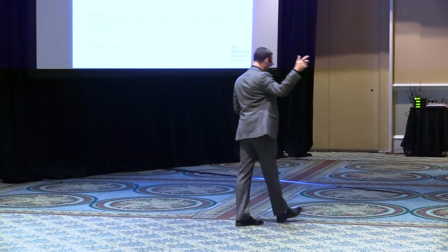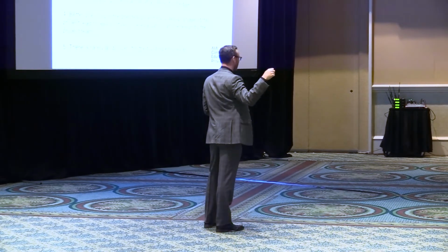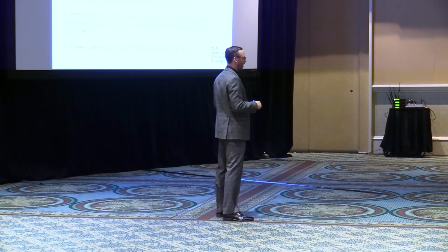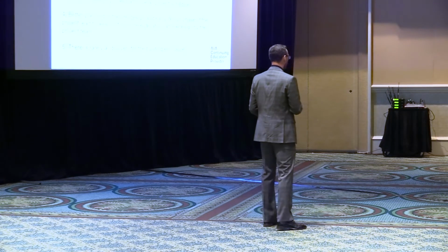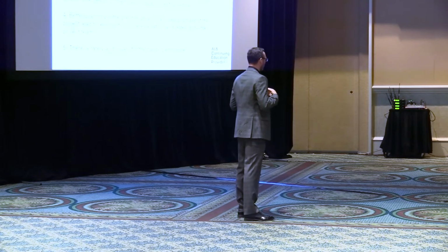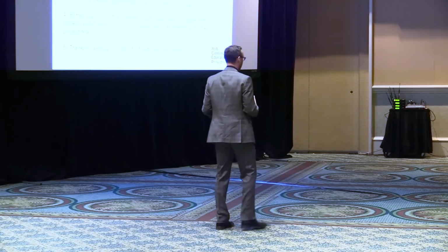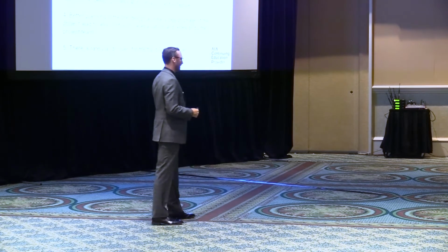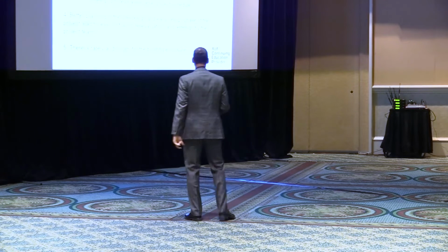My friends back there from Gresham Smith that are mechanical engineers and electrical engineers that do all of our MEP commissioning, you know, I hear them talk all the time about retro-commissioning, or I hear them talk about, oh, the air handling unit wasn't working properly, so we adjusted the controls, right? We don't get that opportunity. If it's not right, it involves destruction. It involves tearing things apart. And so it's even more important in that regard that we get it right during design and that we don't have those issues that involve those do-overs when it's in construction.